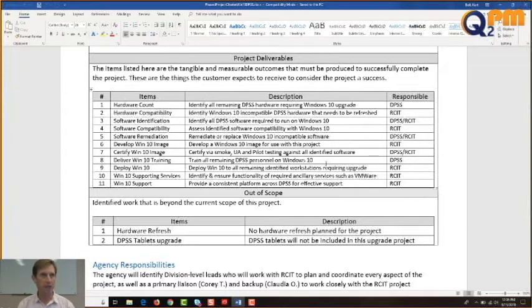I created a change in the log and then went to the customer and said, here's what the change will cost you in terms of time. And they agreed to it, and I just added 6 weeks to the project. So did you do an addendum to the document here? No, I did not change the contract, but I did add a change into the log. So it is logged there.